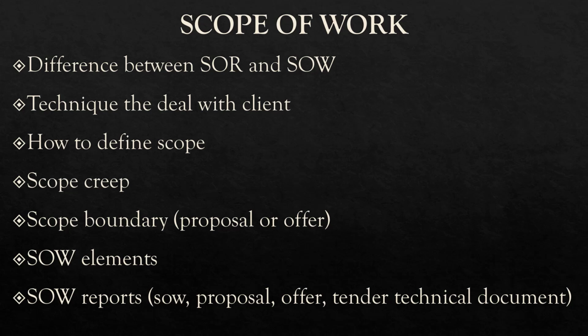If there is no clarification, it will be the best. We can accept one clarification also, but if it is more than that, the scope is not clear. If the scope is not clear, you have a lot of problems. The cost will increase, and maybe many problems during the implementation of the project itself, and we'll see together how to avoid it.